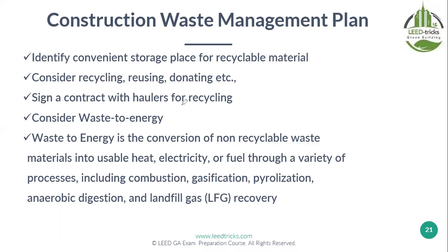Sign a contract with a hauler. The hauler is the truck that will come take the waste, a contractor who will take your waste and has a facility to recycle it, or just does segregation and supplies the material to other contractors and factories. So you now participate in resupply of material, instead of it coming from virgin material from the land.